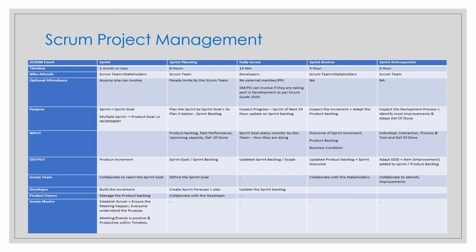That will not be in every sprint, it can be, but it will be decided together in the review meeting. So it is solely at the discretion of the product owner what and when to release the increment. Still, the increment needs to be usable without needing any additional work. So everything like testing, documentation, and even integrating it with the work the other Scrum teams did, we need to check. So when a product backlog item or the increment is considered completed or done, everybody must understand what done means. What is your objective? What done means.